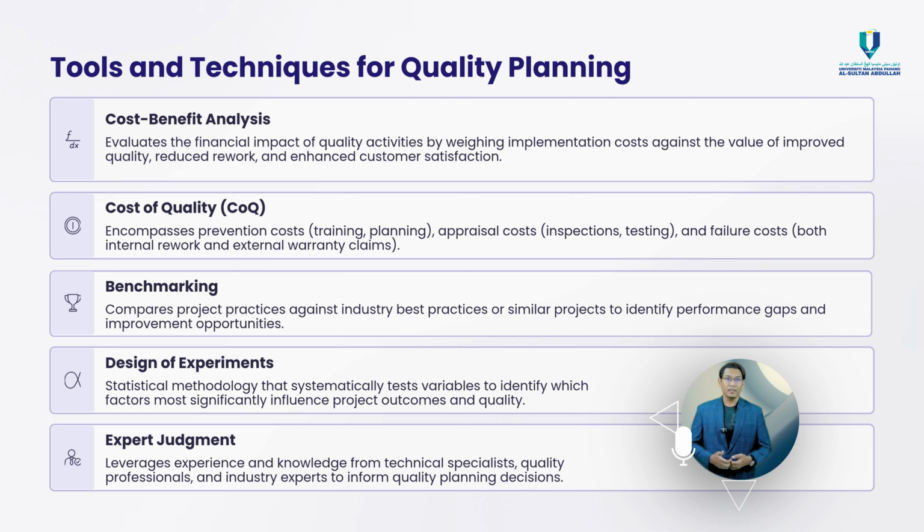For instance, in a cloud migration project within an IT organization, you might use benchmarking to compare cloud service providers in terms of availability, scalability, and security. A cost-benefit analysis might help you decide whether a second layer of encryption is worth the additional processing time and infrastructure cost.